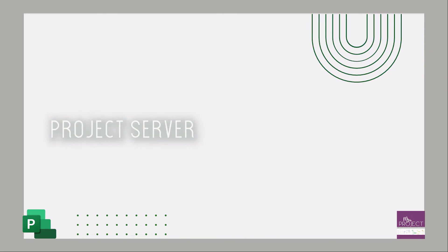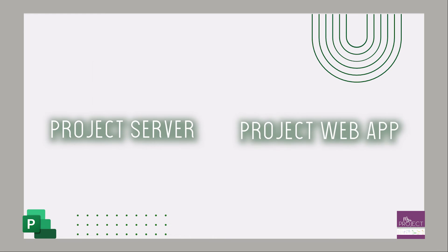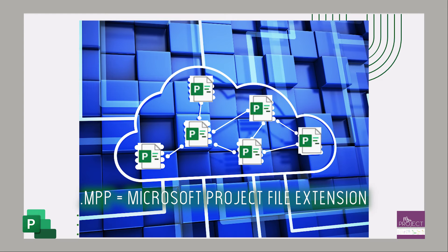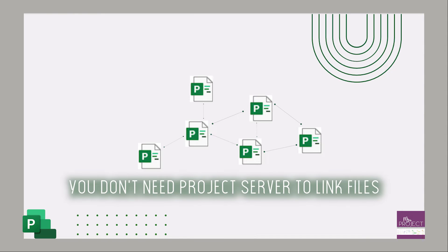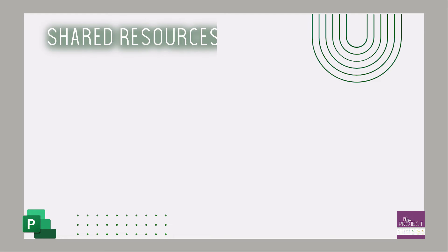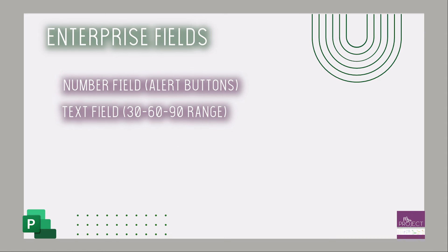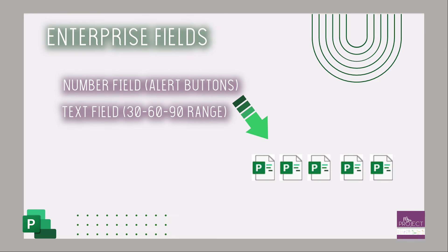The server is also known as the Project Web App. It's a place on a server where all MPP files are stored and can be linked together. But you can link off the server as well, so that's not the selling point. The big advantage is the shared resources. You can create enterprise resources to share across projects. You can also create enterprise fields that are custom and uniform across all projects that are stored on the server.